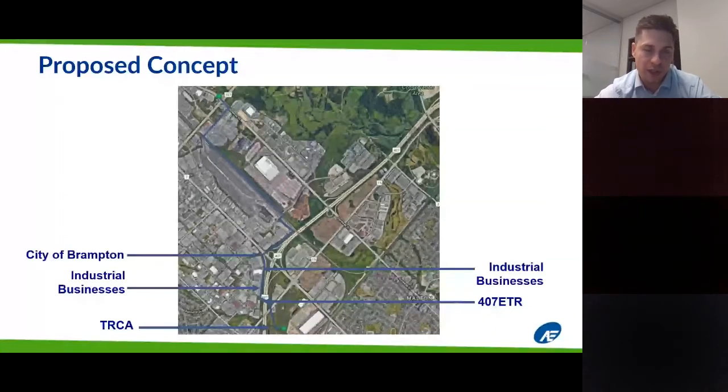Here there's a storm channel at this location where, again, a lot of the storm waters were conveyed to the environment, and so we couldn't disrupt that as well. We had the CN rail yard, which is one of the major distribution or transportation hubs here in the GTA. This rail yard would be essentially a transition point from rail or freight to semi-trucks and deliveries on the road. So you'd have traffic along these intersections day and night, and heavy traffic. So we had to work hand in hand with CN to make sure that we didn't disrupt their business either.